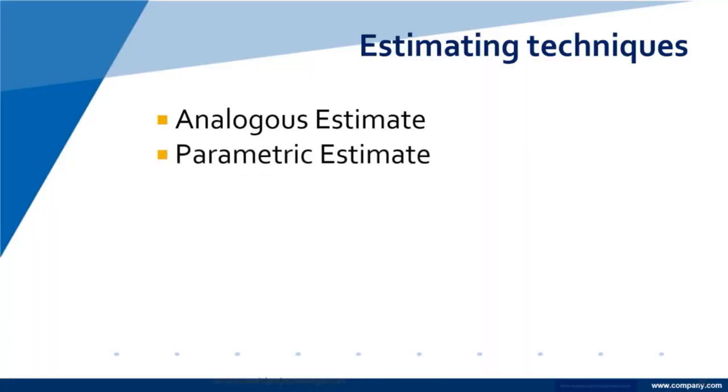Corporate, I have an application that's being upgraded. Typically, an upgrade that lasts 6 months will cost $2 million. So, I go, what are the differences between this typical upgrade that costs $2 million and takes this long and what you're doing now? And it's the differences that I might add into this, which leads me to parametric estimating, which is when you put together a set of factors.